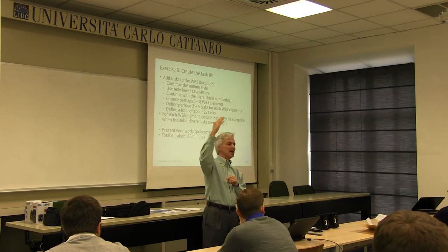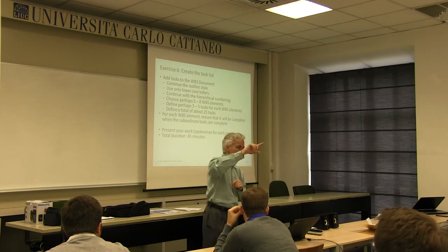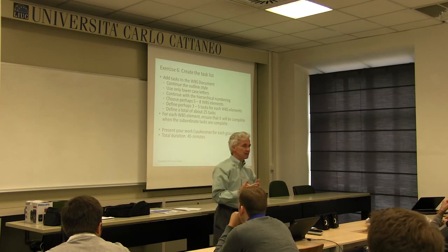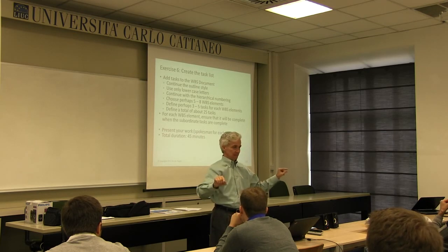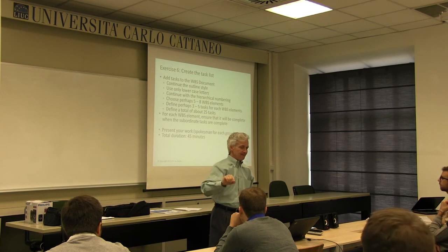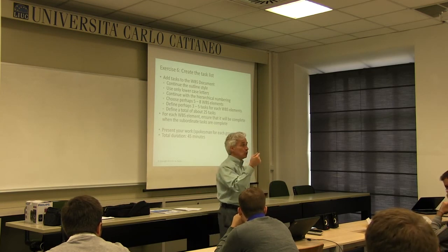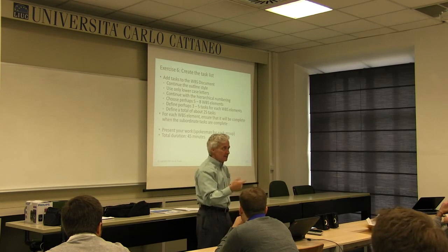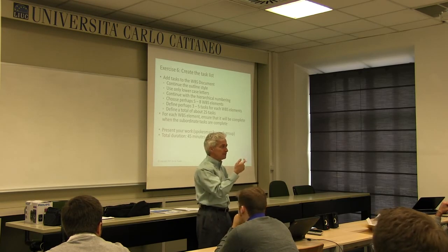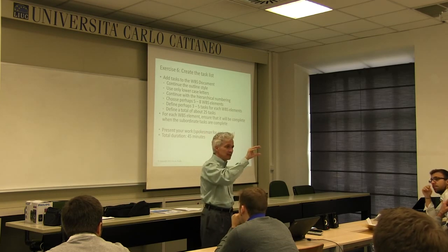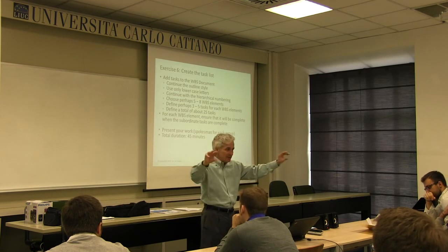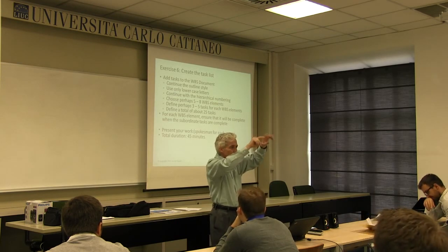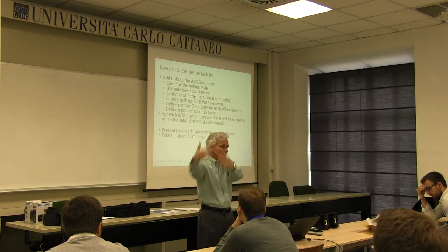Maybe five, maximum eight WBS elements, for each, three to five tasks. So in the end, you should have about 25 tasks. Only define the tasks. When you look at the tasks, once all of the tasks are complete, the WBS item should be complete. So if you complete all the tasks, the WBS element is complete. When you complete all of the WBS sub-elements, the element above is complete. So choose one WBS element, several sub-elements, make tasks. Choose another, make tasks under those.